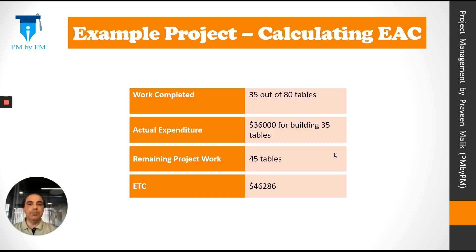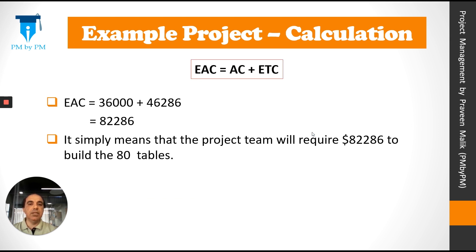Let's look at our example project. On the control date, we have completed 35 out of 80 tables and we have spent $36,000 for building these 35 tables. 45 tables are still remaining. In the previous video, we had calculated ETC as $46,286. Putting the values in our formula, EAC = AC + ETC gives us $82,286. This means the project team will require $82,286 to build all 80 tables.